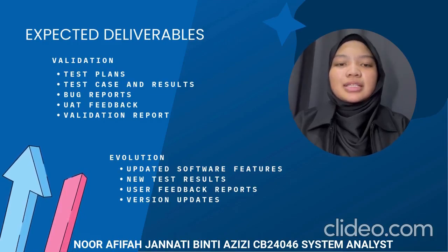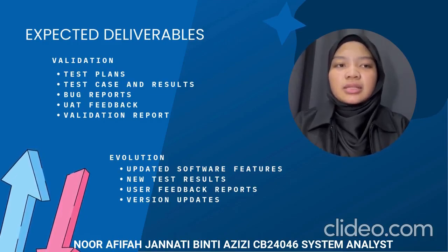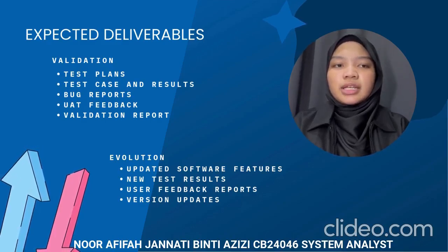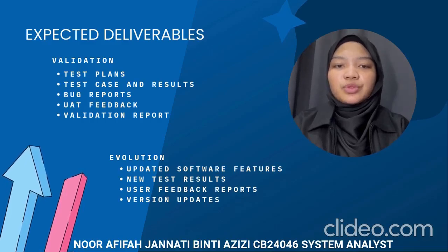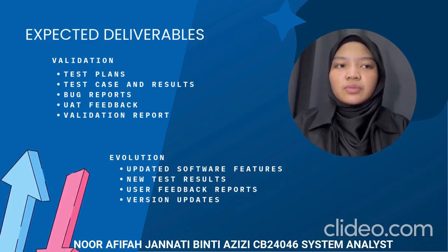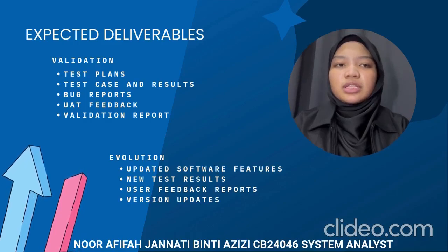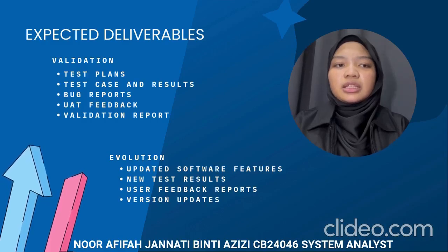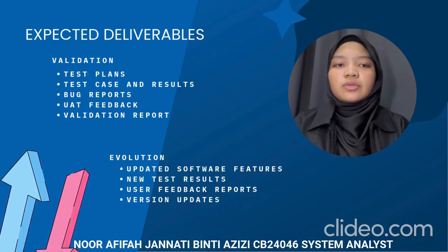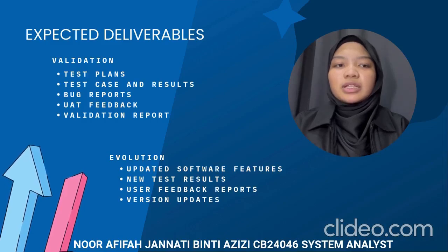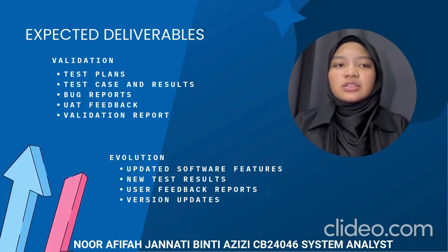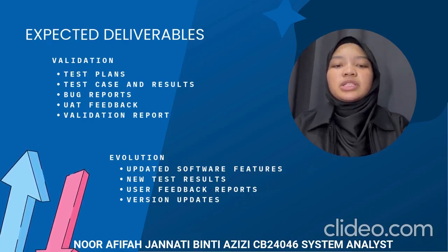Third, the expected deliverables for the validation phase are test plans outlining the types of tests to be conducted, such as functional tests, performance tests, and security tests. Then, the test cases and test results for each feature should be provided, detailing how each part of the website performed during testing. If any bugs or issues are found, bug reports are created, along with their severity and status updates. Additionally, user acceptance testing feedback is collected from real users, which helps to ensure that the website meets user expectations in terms of usability and design. The final deliverable is a validation report that summarizes all the findings from the testing phase.